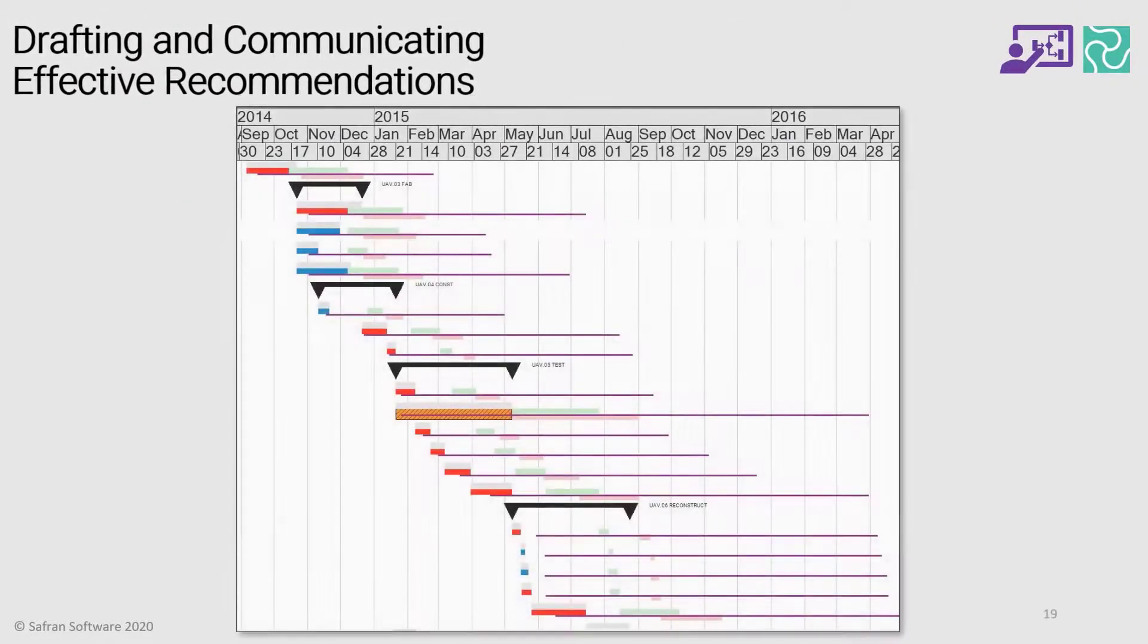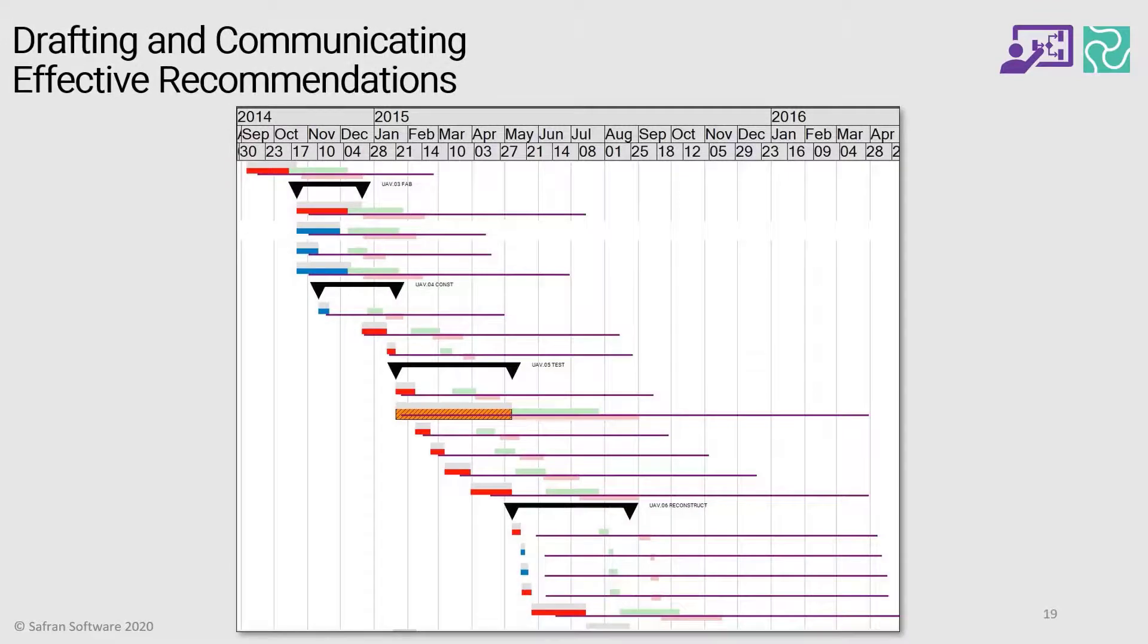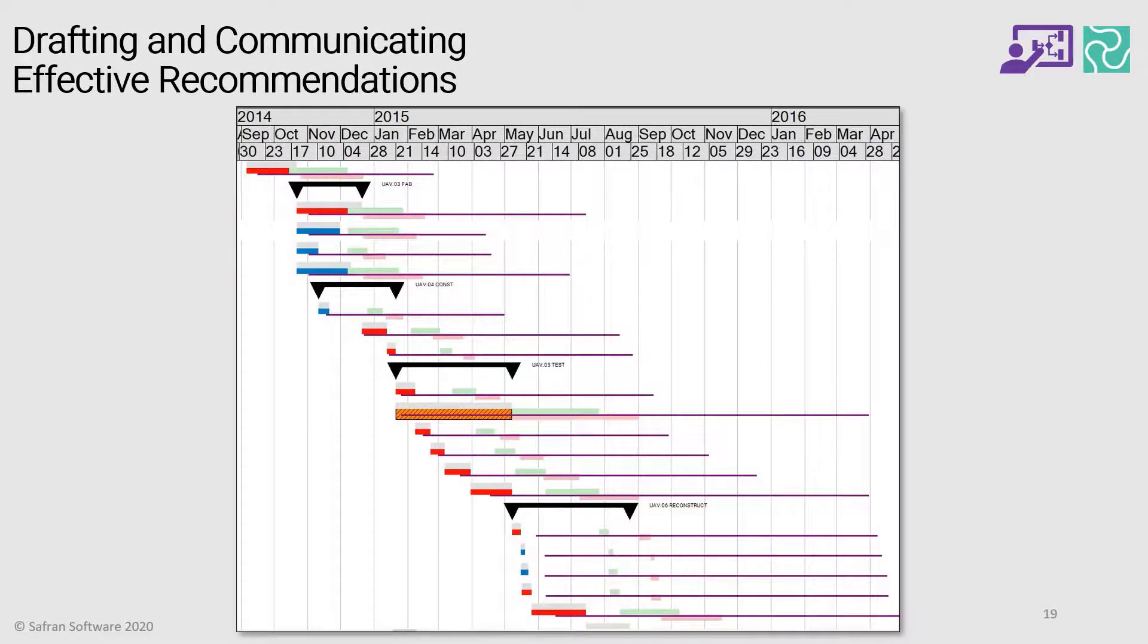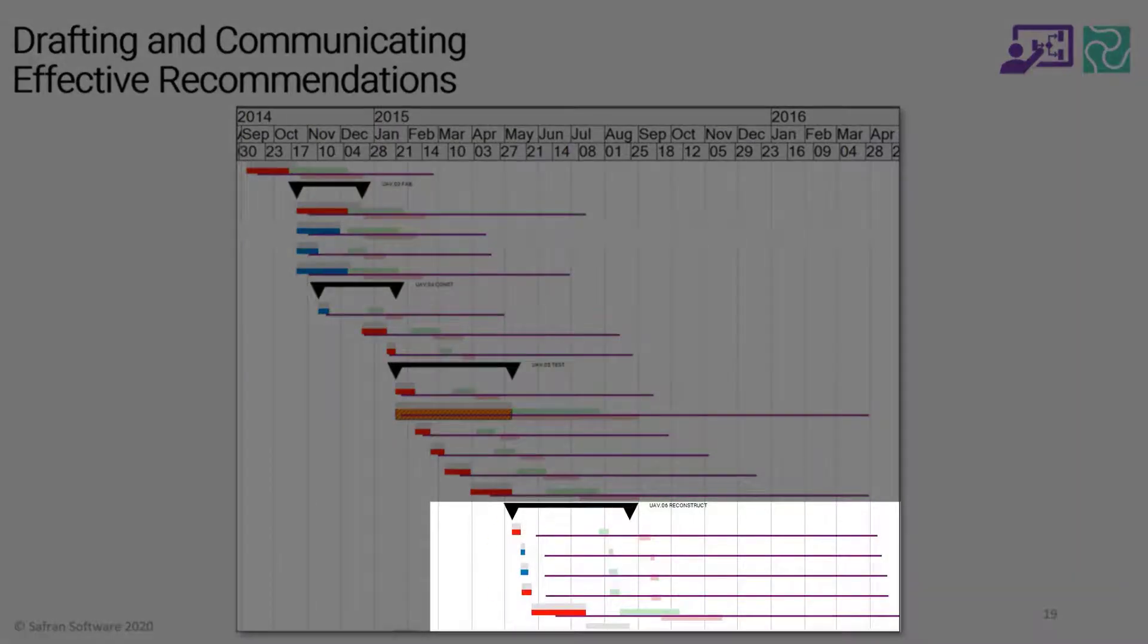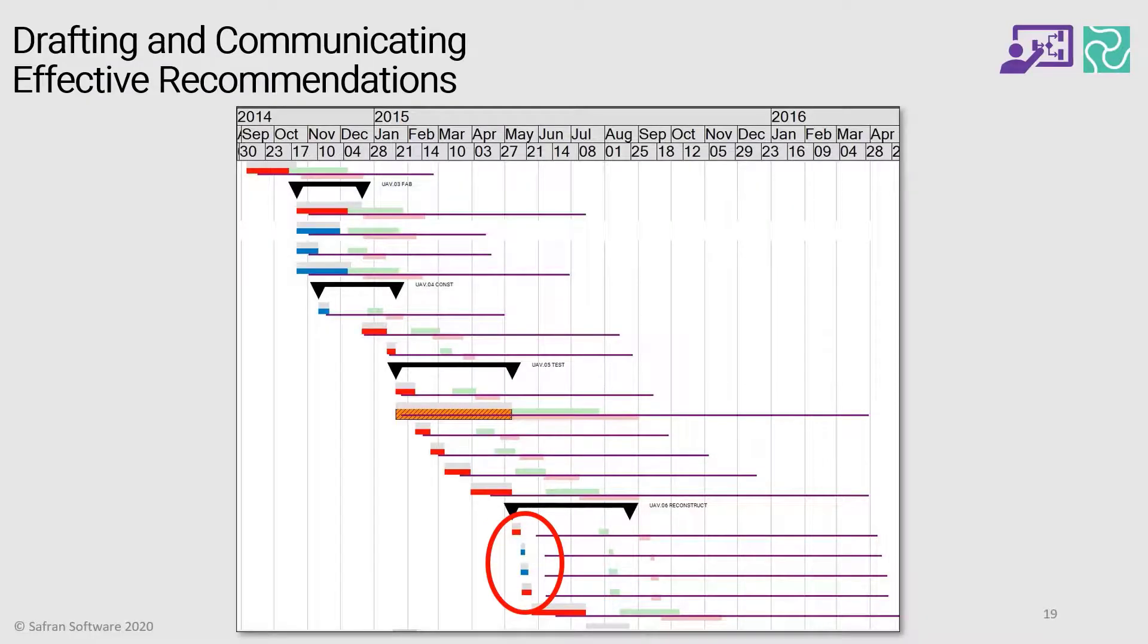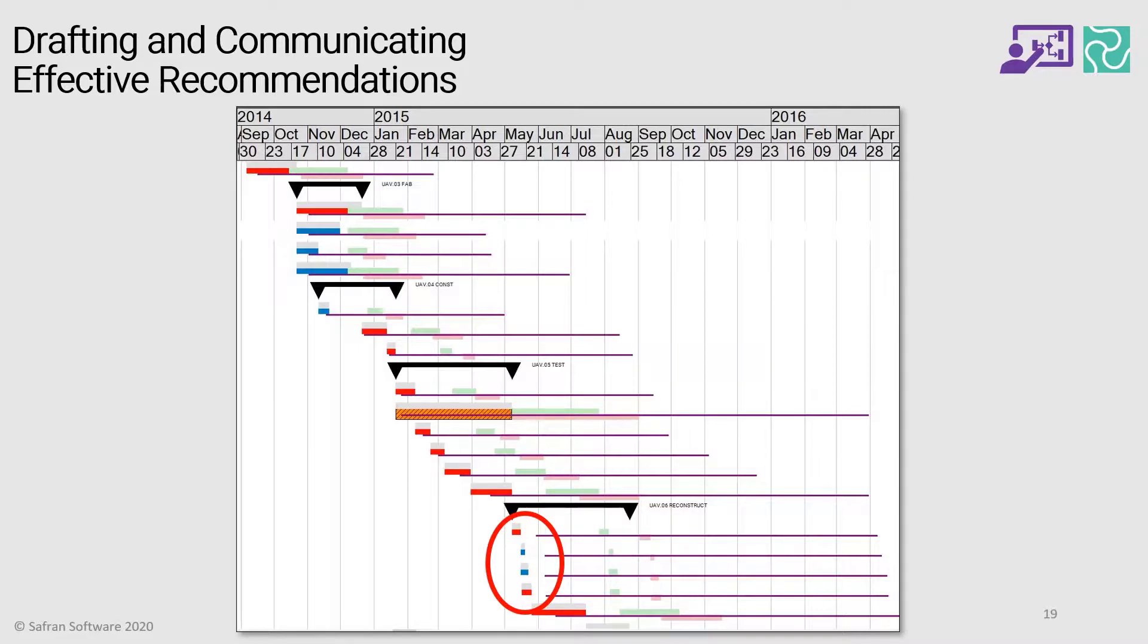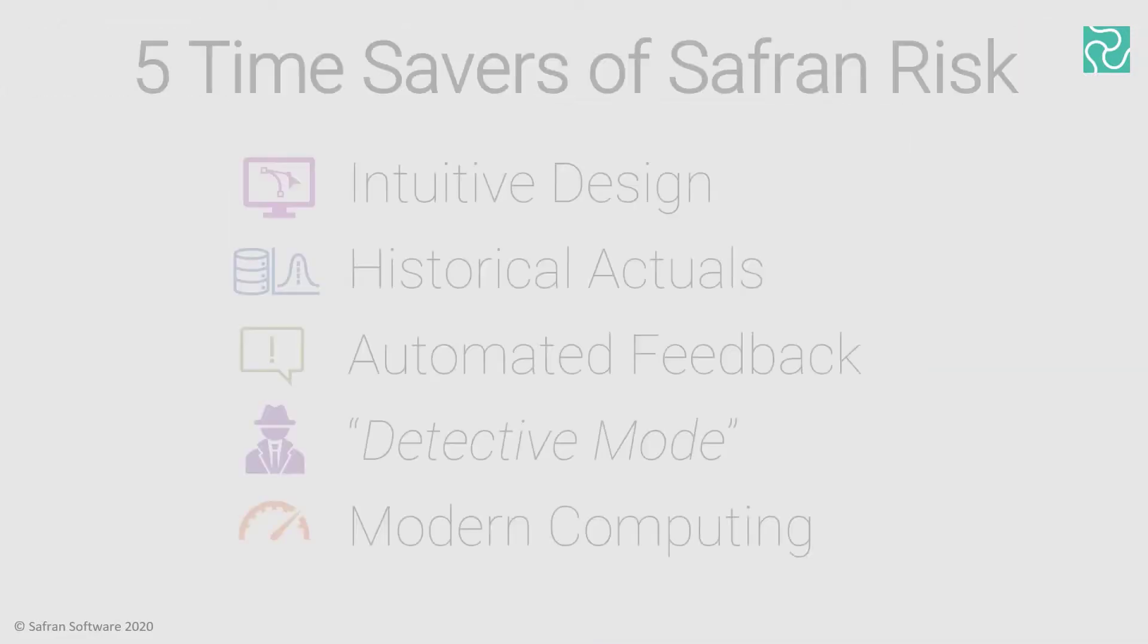Or alternatively, a box and whisker style Gantt chart with all the risks enabled, but giving you the full range of volatility between the P1 and the P100, the purple whiskers, for each activity with P50 and P80 green and pink boxes indicating the likelier positions. The additional insight that you may have spotted being the compounded effect of subsequent delays is shown in unambiguous terms where the P1 has diverged far from where the original deterministic end date has actually been. So, communicating in ranges rather than single point estimates also helps land a message. We must resist the temptation to deliver the contractual minimum requirement of just a single point answer.